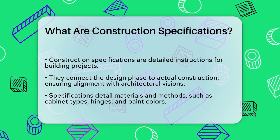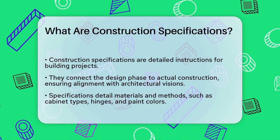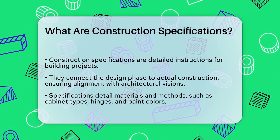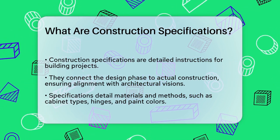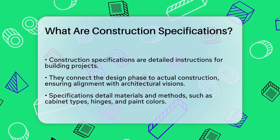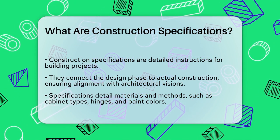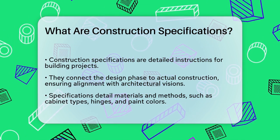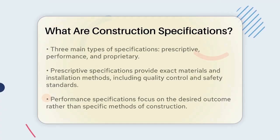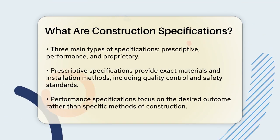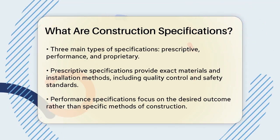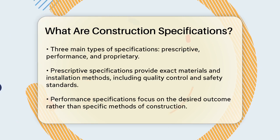Imagine you're building a bathroom. The drawings will show you where everything goes, but the specifications will tell you exactly what materials to use, such as the type of cabinet, hinges, and paint color. These specs are so detailed that they even specify the product numbers for the materials.